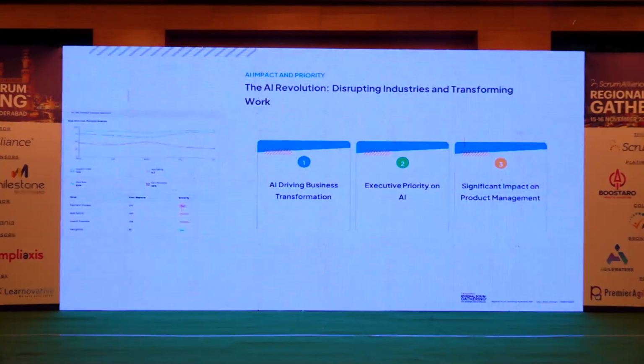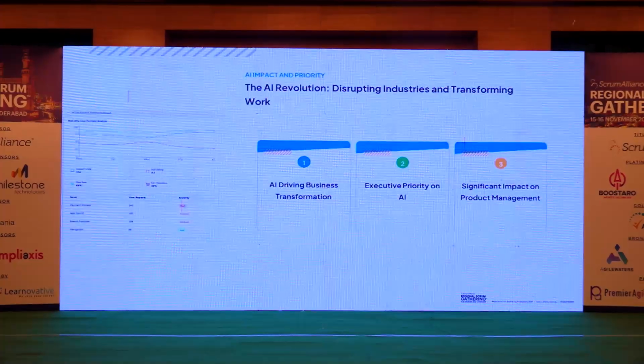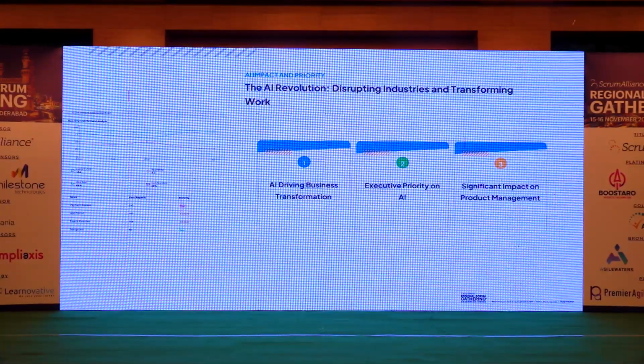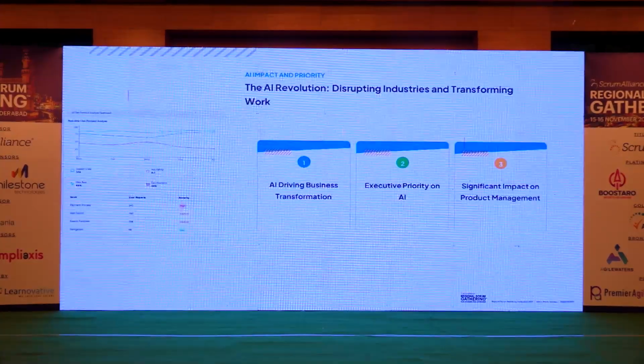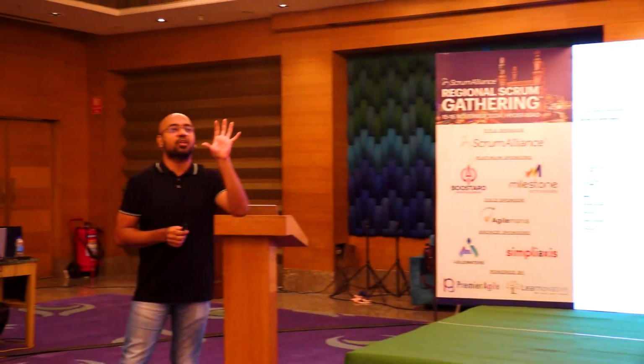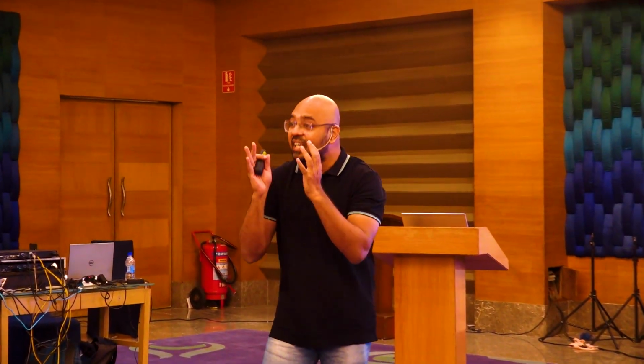Now it takes less than 4 hours for me to do that, because we built an internal product which collects the overall data in my organization and gives me a prediction based upon the project I am doing, the product I am developing, the kind of customers, the team size, the team structure, and the skill set. Based on all these things, it gives me a projection where I can see that a potential delay is going to happen, and then we add that to our program plan to ensure it does not fail. So there is a significant increase in forecasting.